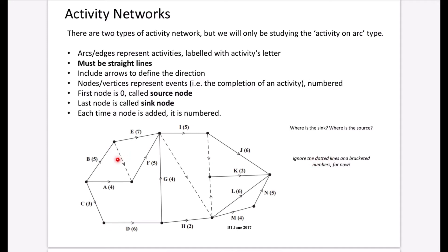Ignore the dotted lines and the bracketed numbers for now. Activity on arc networks must use straight lines — no curved lines and no lines crossing over each other. We include arrows to define the direction of flow from the start to the end of the project. The nodes or vertices represent events, i.e. the completion of an activity, and are usually numbered. In recent mark schemes, nodes are drawn without numbers, so don't worry too much about numbering.